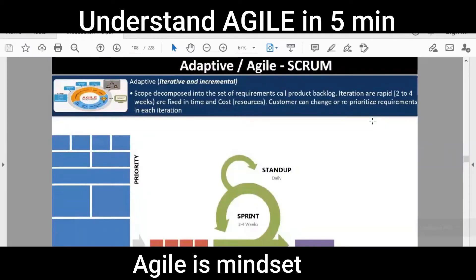In Agile, you first get a product vision — something a customer requested or the company wants to build. You make a product vision that this thing has to be built, then you break down that product vision into small stories known as user stories. User stories follow this format: as a user, I want to do this so that this can happen. We discussed the example of a banking system.